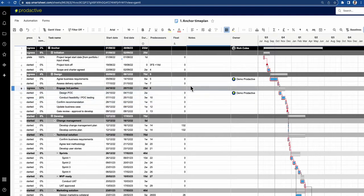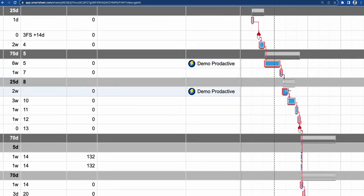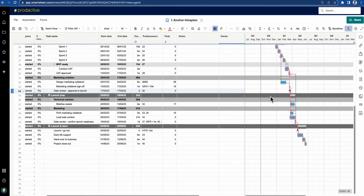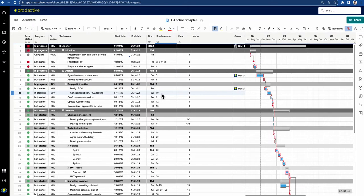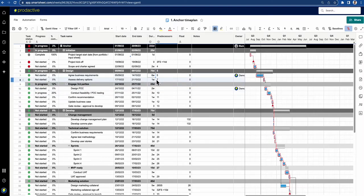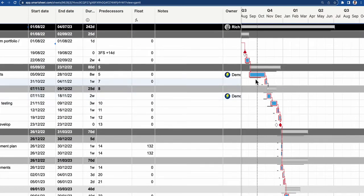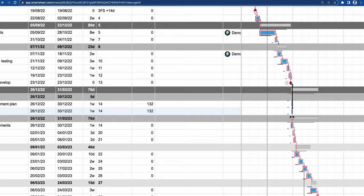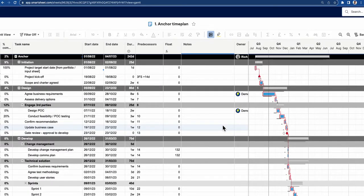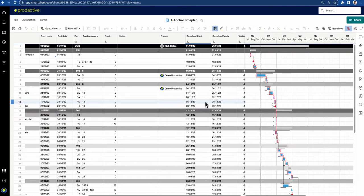If anything happens and there are delays — say 'agree business requirements' is delayed — you can see there's a little black line underneath showing the original start dates. If I push that task out to eight weeks, the task shifts and everything on the critical path that's been impacted is pushed out. You can see clearly what impact that change has had on your project.